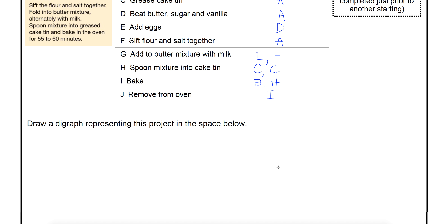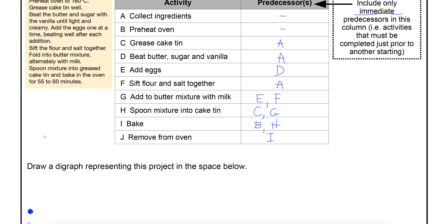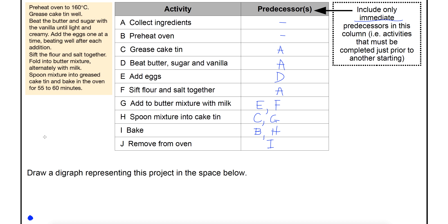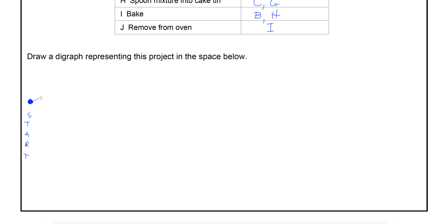We're going to have a start vertex — start at the far left of your page and mark a vertex there. What you're going to do is look at your table and find anything that doesn't have a predecessor. A and B don't have a predecessor, so A and B are going to come from the starting vertex. I'll draw A going one way and B going another. I haven't put arrows on yet because I might need to change things.